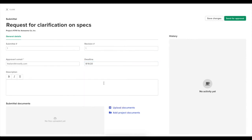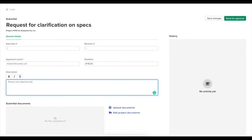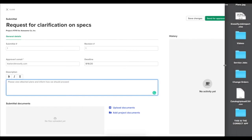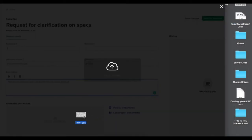Then we'll select a deadline for when we need a response. We can enter in a description of this submittal to provide more information. And then last, we'll also have the option of uploading a document to be associated with this submittal.